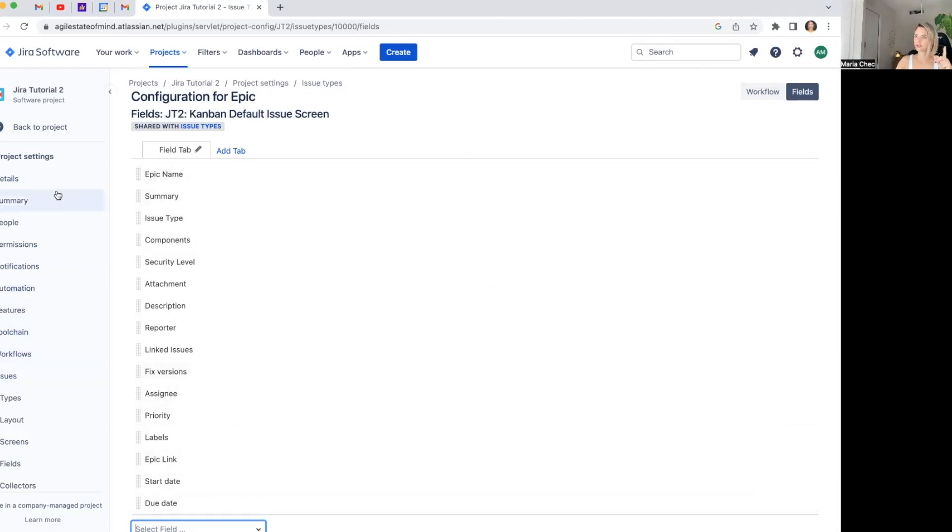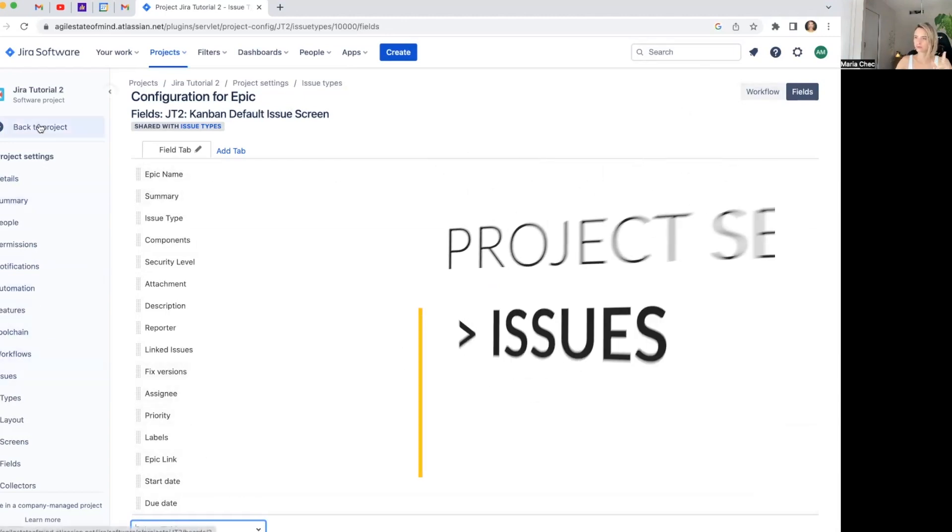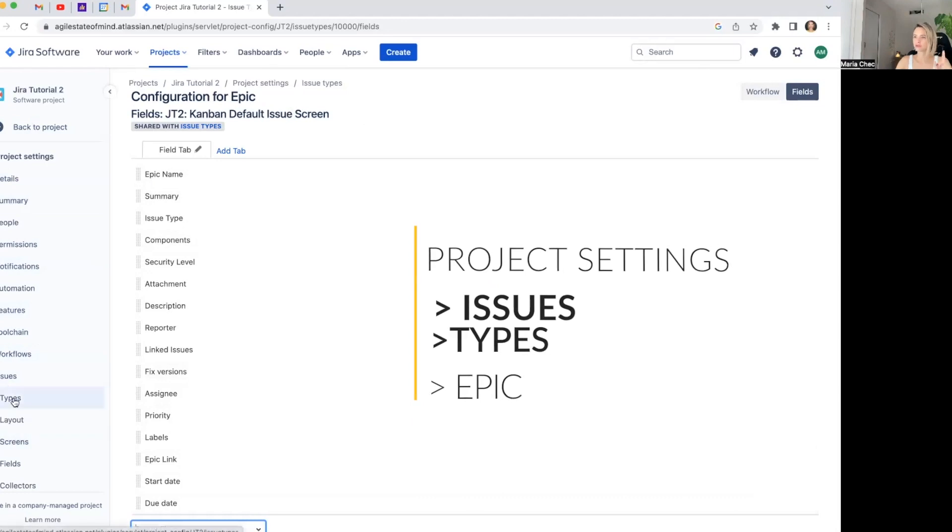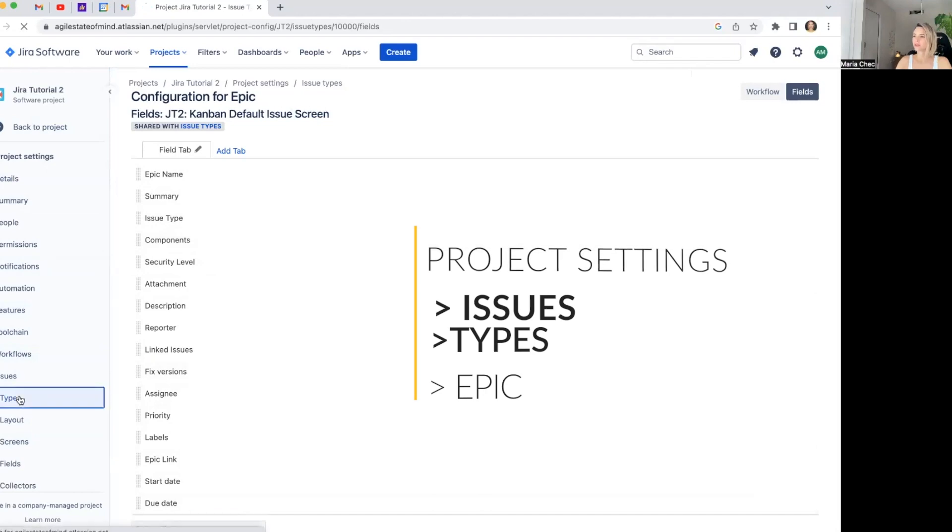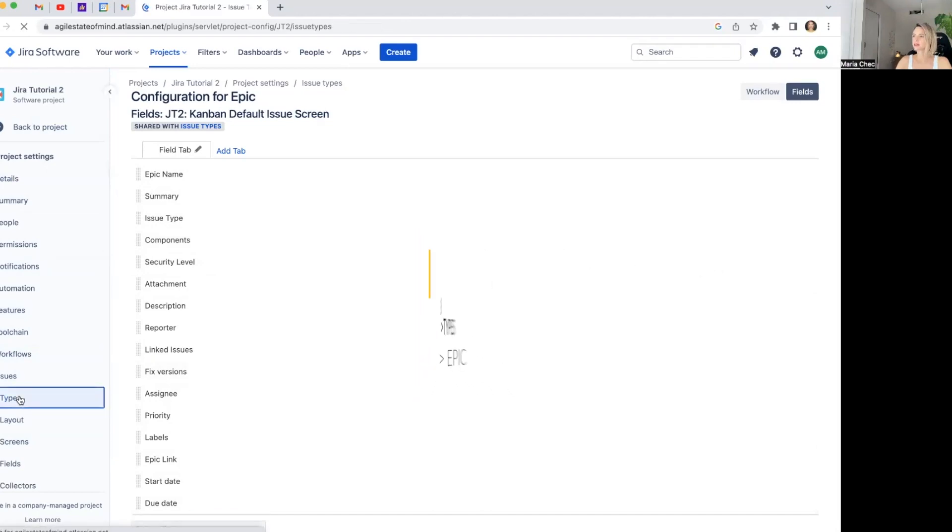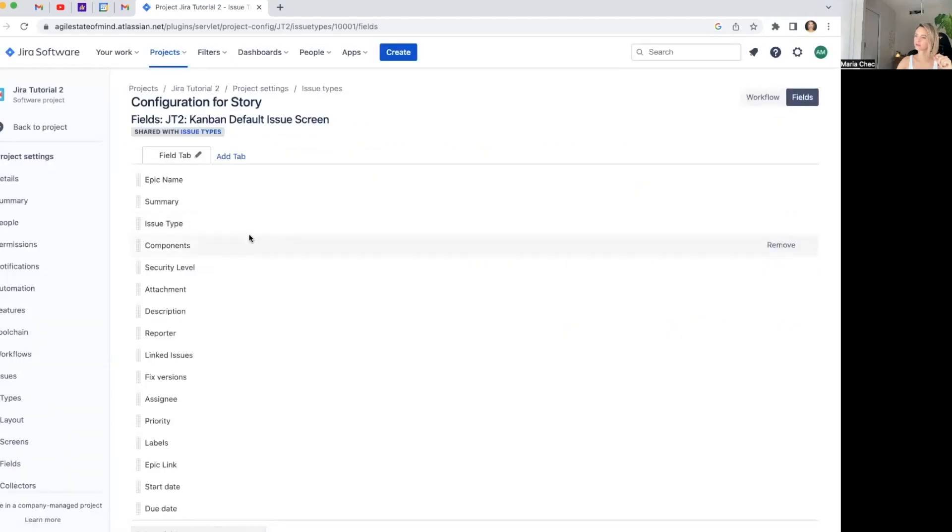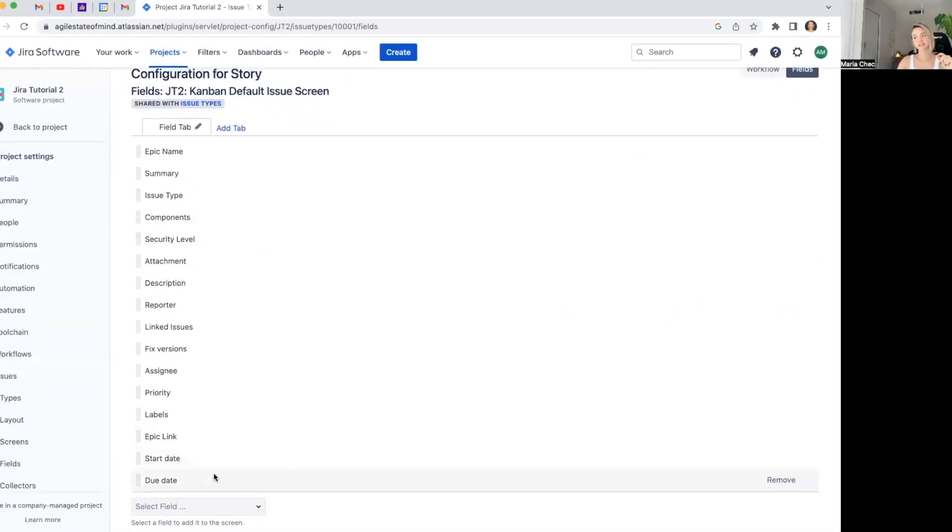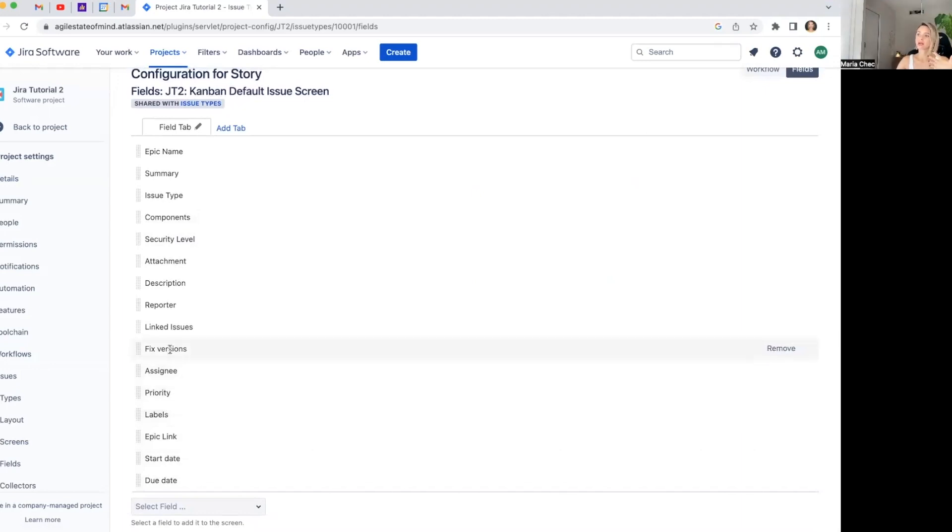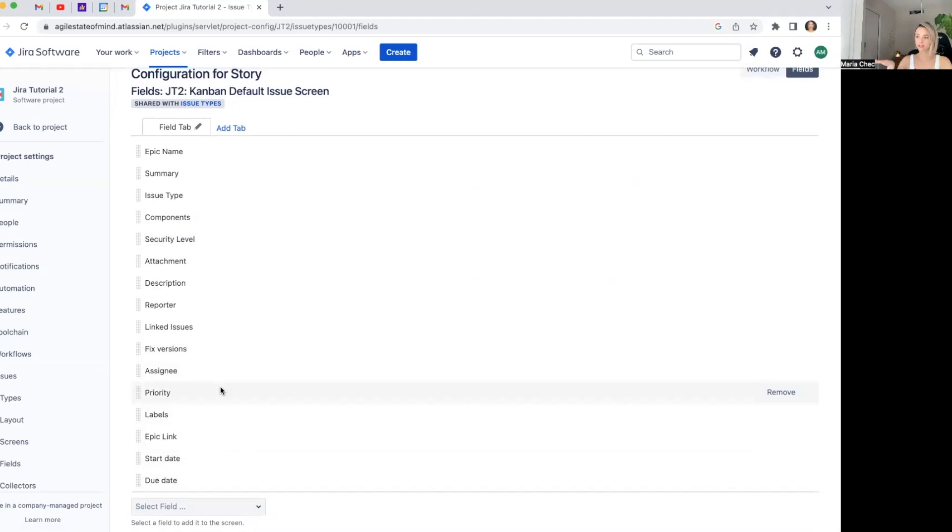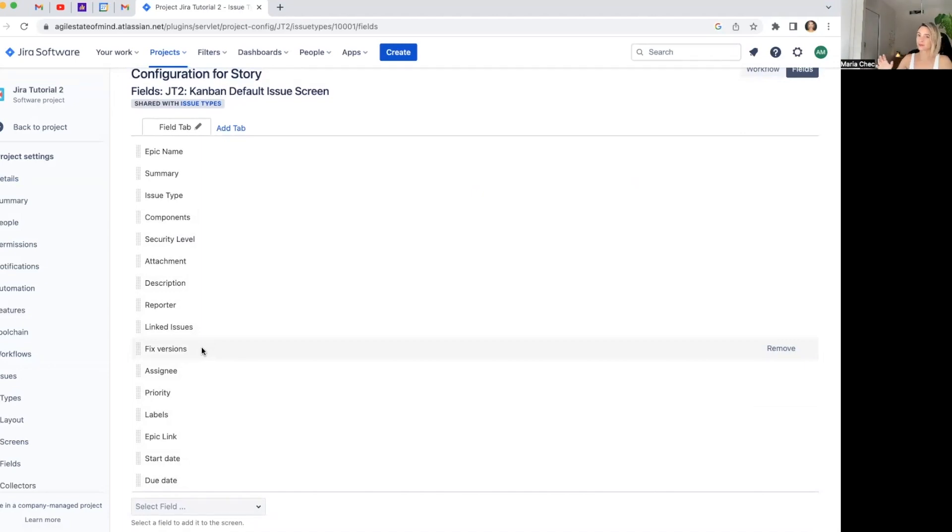Back again, you need to go to project settings, issues, types, and click on the issue type you want to add fields to. Now we can check if actually, if I added those fields to epic, would they be added to story as well? Yes. Look at that. So basically this is one of those things in Jira because you would think, I don't need the same fields on a story than on the epic, but probably some setting is set to that the screens are the same in all the issues. So don't start deleting fields from one of the issues if you want to have them in the other, because then they will disappear.